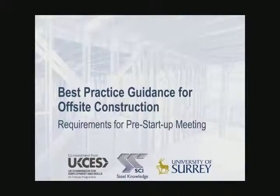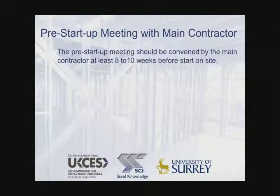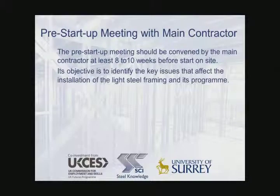This presentation covers the requirements for the pre-startup meeting between the main contractor and the light steel supplier. The pre-startup meeting should be convened by the main contractor at least 8 to 10 weeks before start on site. Its objective is to identify the key issues that affect the installation of the light steel framing and the construction program.